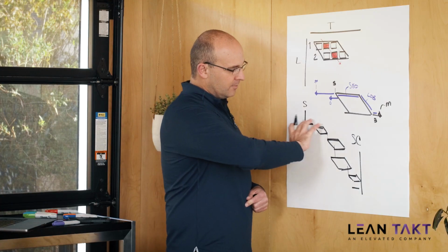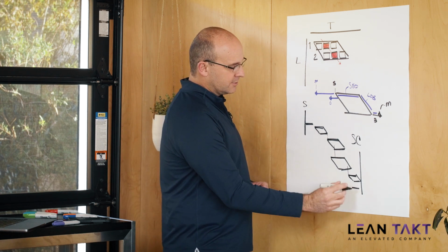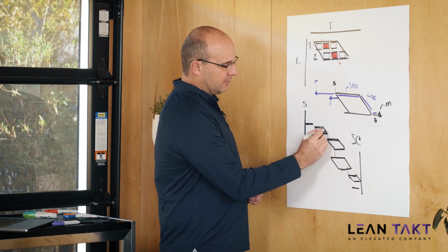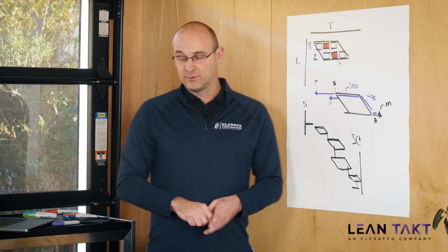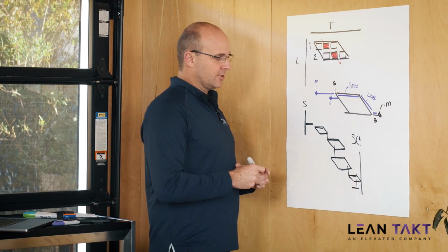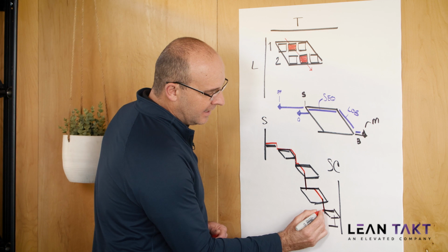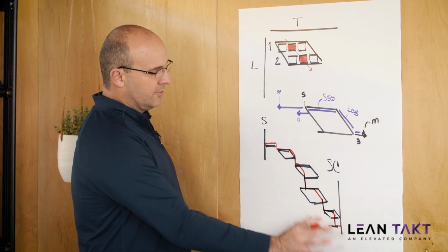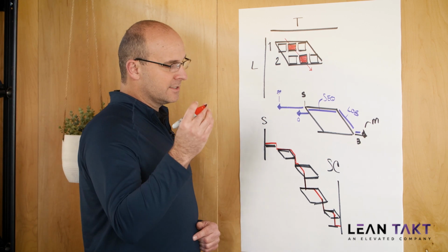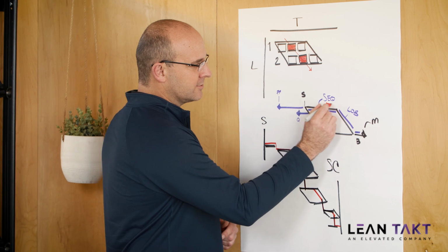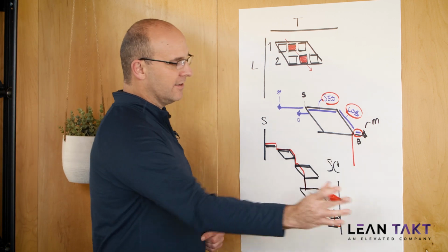So your macro level takt plan especially will be pieced together with multiple phases, and they will be linked together with what we call interdependence ties. And here's something really cool that I want to show you. Once this is correct, your path of critical flow will move through the building and show through those phases in what's called a critical flow path, or a path of critical flow, but it's comprised of the sequences, so I'll circle that, your line of balance, your buffers, and your milestone, and then any ties that you have to other phases.